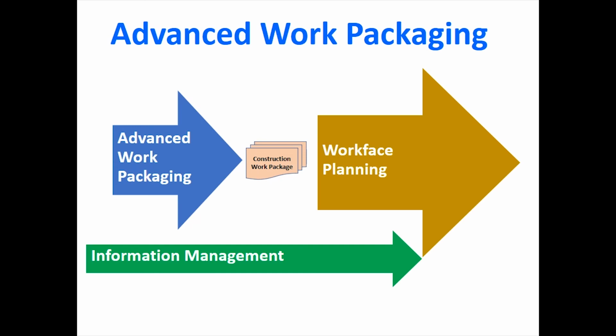It starts with the processes upstream of the construction work package and aligns engineering work packages with procurement work packages. This populates the construction work packages with all of the drawings and materials and gets them ready to be carved into installation work packages by the construction team.